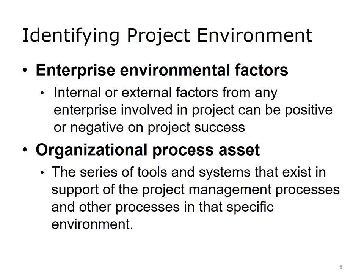During project selection, the existence and value of the following process assets should be considered: policies — are there documented and enforceable policies that support the required approach to the proposed project; procedures — have procedures been established that will facilitate the completion of each component; standards — what standards exist at the organizational level and do they add to or detract from possible project success; guidelines — are there guidelines for how to best approach specific tasks; historical information — is there a documented history of similar projects; and lessons learned — is there a documented set of lessons learned from similar previous projects that can help guide the proposed project toward success.